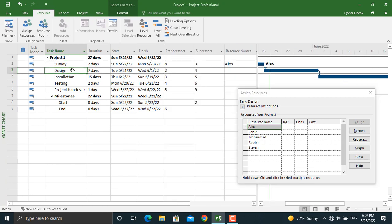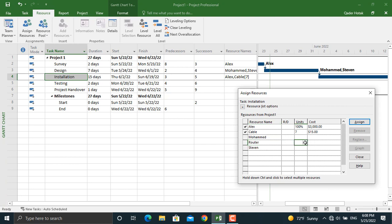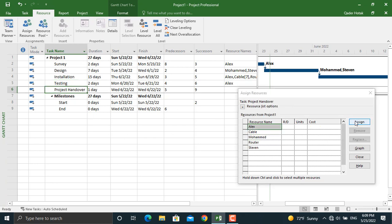For Design, we will assign Mohammed and Steven. For Installation, we will assign Alex, and we will also assign Cable — 7 meters. Click Assign, then select 2 Routers and assign them. For Testing we will assign only Alex. For Project Handover we will assign all of our resources.